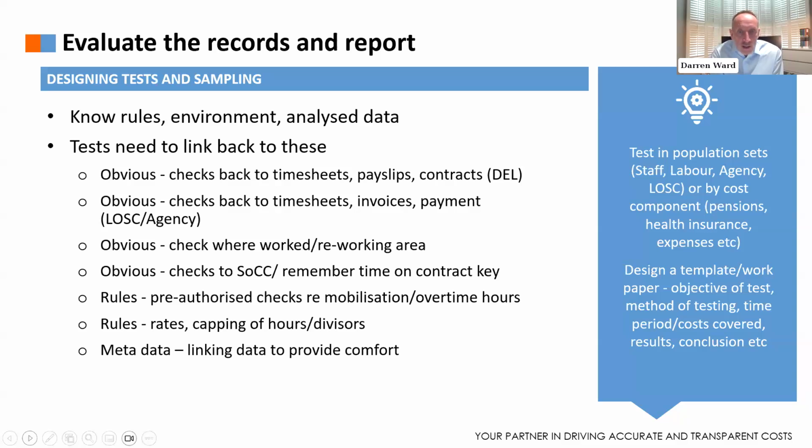A good one I've got there is the rule about pre-authorised overtime. You've met your contractor, and they share with you what they do every month. They produce an overtime hours report separately as part of the application for payment. With that, they show all the sign-offs or the general communications that give you confidence that hours have been pre-approved. So again, it's a low risk because you've got confidence of the control being in place.